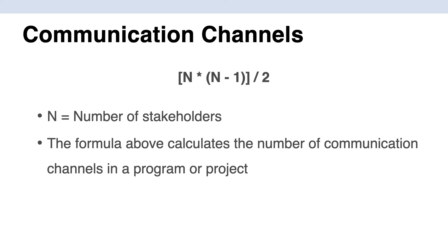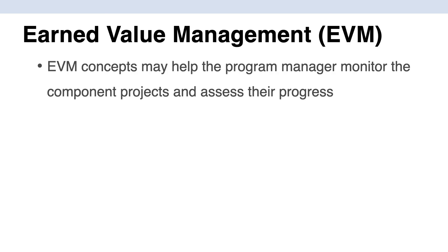Our next formula is communication channels. The way you calculate the number of communication channels is: n × (n − 1) ÷ 2, where n equals the number of stakeholders. For example, if there are five people on your project team: 5 × 4 = 20, divided by 2 = 10. So with five people on your project team there will be 10 possible communication channels.